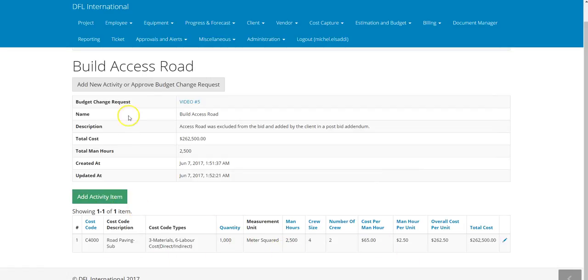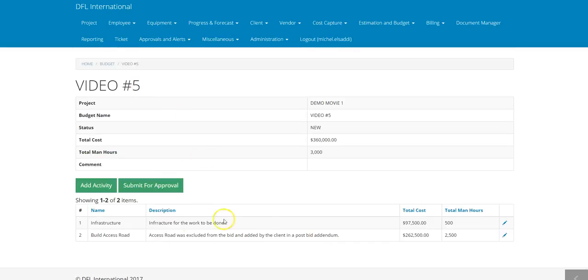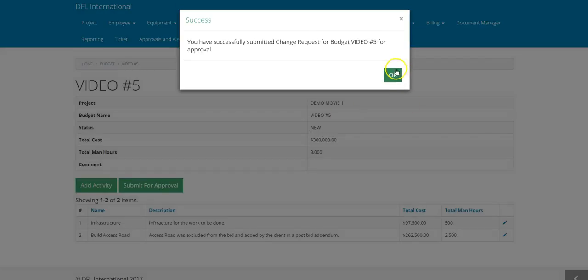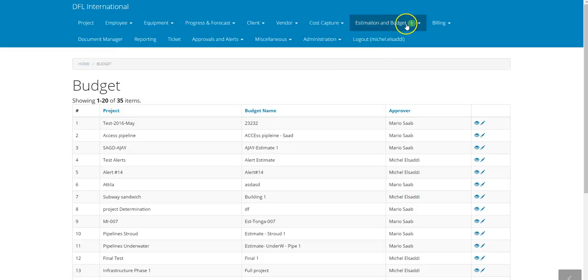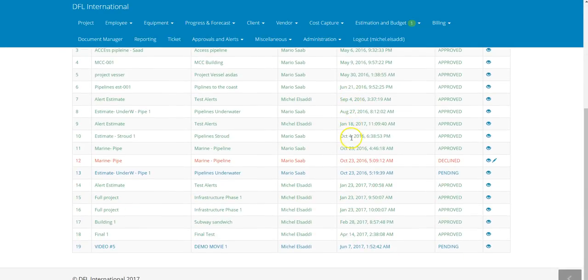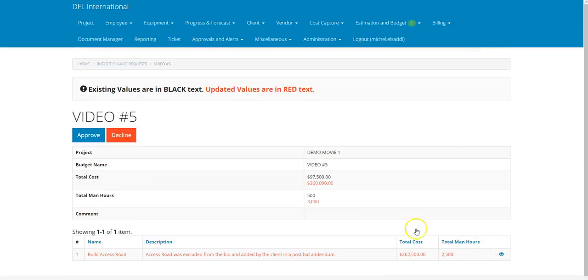We can add another activity, but for the sake of this video, we're just going to click on add new activity. You can add multiple items here. So we already added $262,000 to our $97,000 project, and we can submit for approval. Now it's submitted for approval. You can see it here. It now goes to the budget change requests. I go into the budget change request, and it's at the bottom. It's pending.